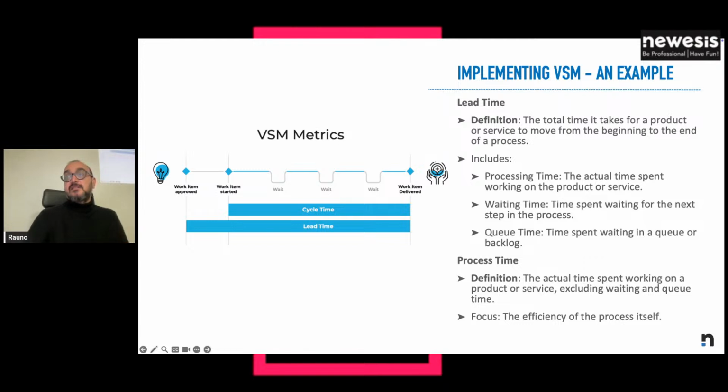This is something that you can then adjust, adjusting your flow. So if you know that you have a set of steps, and for example, you are doing some development, and then you have a QA phase that has a different team with its own tool and its own process, and you know that your QA team is able to test a maximum of 4 features at the same time, you should plan your previous step to match that work in progress limit.